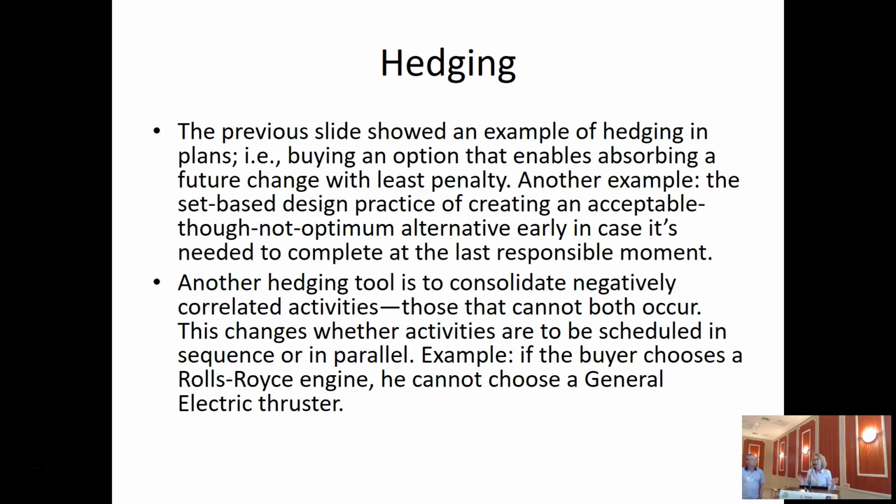portfolio planning. And the general behavior of correlations is that consolidating negatively correlated activities will reduce the risk, while consolidating positively correlated activities will increase the risk. And the better strategy for positive correlations is to develop buffers, while for negative correlations it is flexibility. So what we suggest here is that in order to move from reactive to proactive strategies, we need to create flexibility in planning.